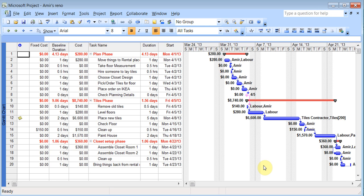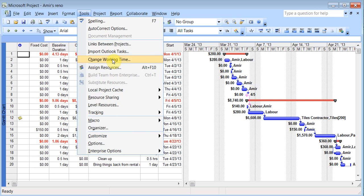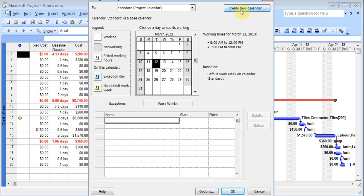Now we can talk about some customization options in relation to first calendars. Because, say for example, you had some people who were having different times of work. So you can create special calendars for them and you can assign to them in the resources sheet. So to do that, you can go to tools, change working time, and then you click on create new calendar.